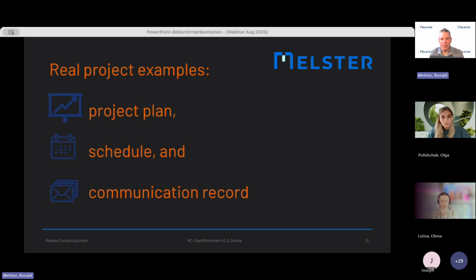Now, what's important to understand is the character of a schedule and how it's structured. In bigger projects, there are usually layers of schedules. The top level is the one for defining the overall project and the milestones and phases which are kept consistent with the customer milestones. And then you have one or two more layers, and these phases and milestones are detailed. And then we come to the lowest level, which is typically on team level. And this schedule defines the activities which must be performed by individual team members.